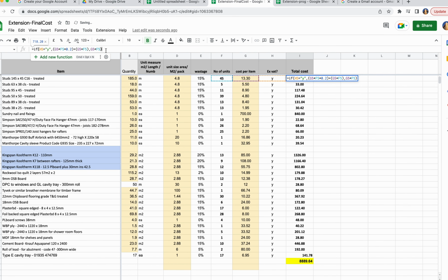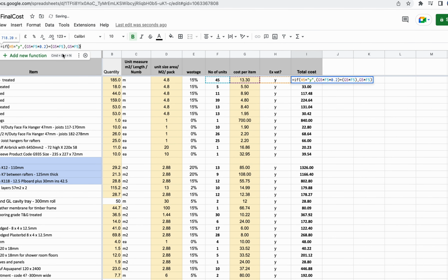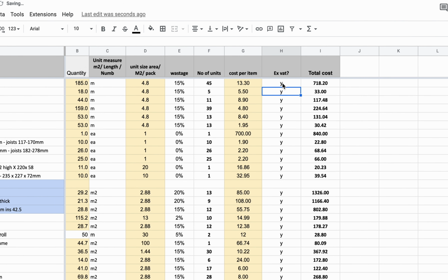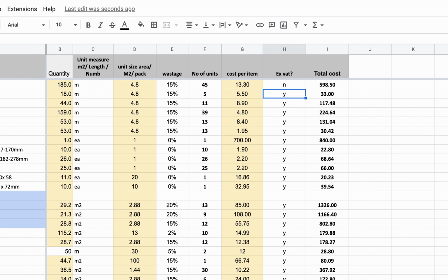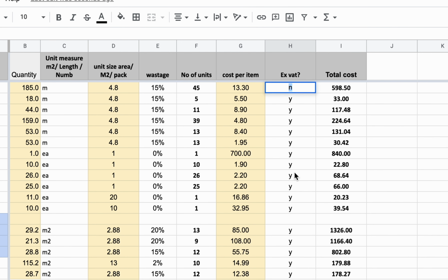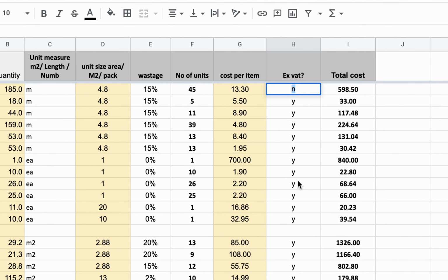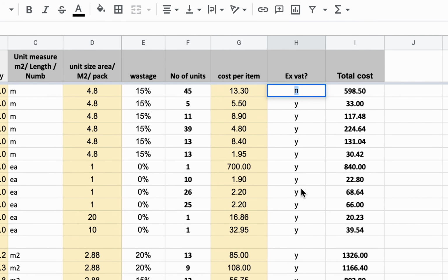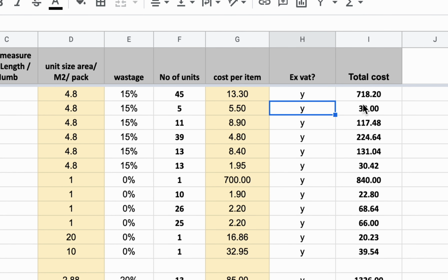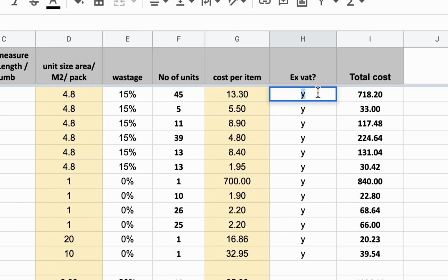For self-builders doing an extension or attic, you'd want all these to show the cost including VAT, because you want to know the overall price. Whereas if you were building a house from scratch, and you'll be zero rate in your purchases, or you're a VAT registered business, putting it through the business, for both you'd want to see the total exclusive of VAT, because you'll be claiming back all of that VAT, and therefore you want to know what your net cost is.